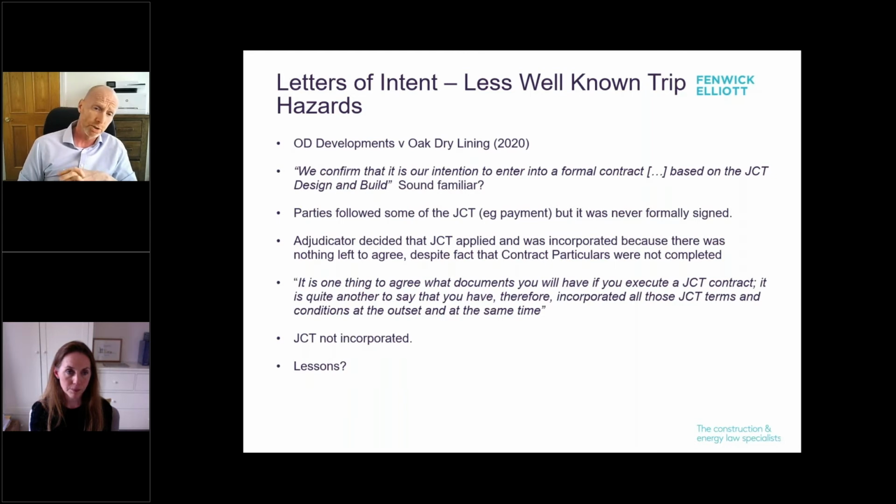So anyway, it goes off to court. And this is the interesting bit. The judge said here, and I quote that in just a little bit, it's one thing to agree what documents you will have if you sign a building contract. So again, a typical letter of intent will say, we intend to sign a building contract and we intend these documents to form part of it, okay? But he went on to say it's quite another thing to say that you've incorporated all those terms. So on that basis, despite the fact that it talked about the form of contract, despite the fact the parties had operated it and never said they hadn't, judge turned around and said, no, not incorporated.